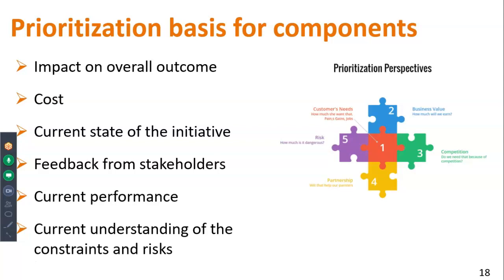Do we have constraints that have been added to our landscape that mean that we're going to have to reassess what we are going to do and how we're going to do it? I don't know, if all of a sudden a regulatory ruling comes down from an external regulatory body that says you must comply with this ruling within a certain period of time. Well, obviously we need to reassess our priorities to ensure that we meet that constraint.